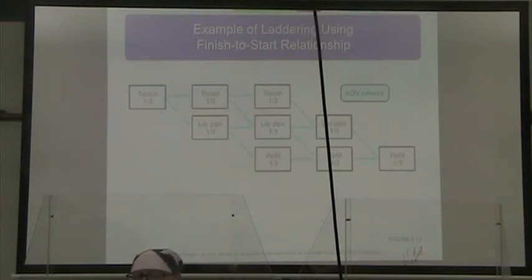Then, when that's done, we're laying the last 1/3 of the pipe and refilling the second 1/3 of the trench. And then finally, we're refilling the last part of the trench, right? So that way, instead of everything being strung way out, we've condensed it to a smaller time frame.